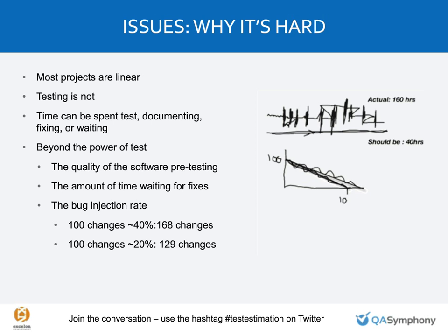What I did was I drew a line from the top left through the second curve and then extended it out. The difference between the first line and the second line is the difference between the plan and reality. And what we can do is actually project based on performance, and we're going to talk about that later.